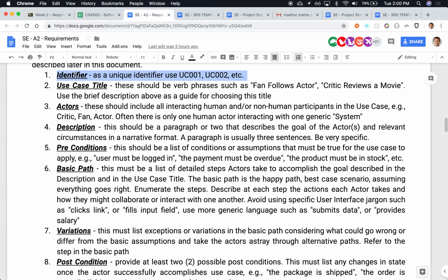If you're Waterfall, you don't write anything until everything's fully documented. If you're in Agile, you have it spelled out very lightly, and then whenever you pick one out for implementation, then you do the full analysis.